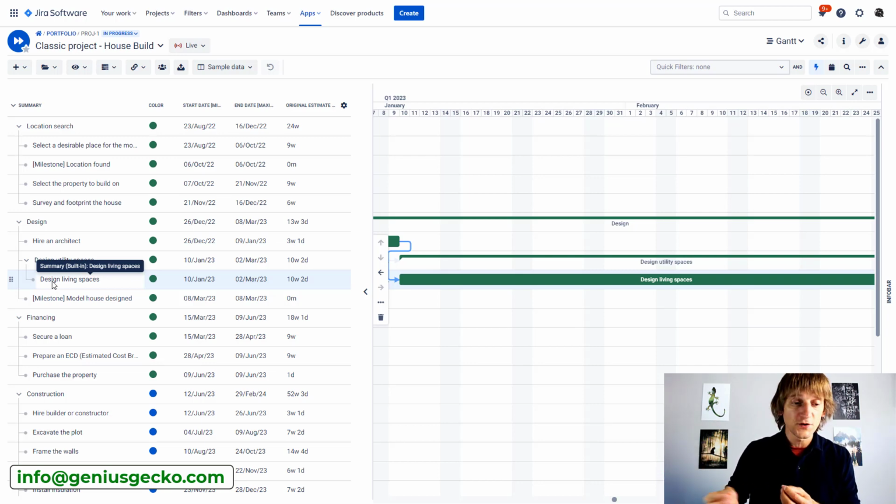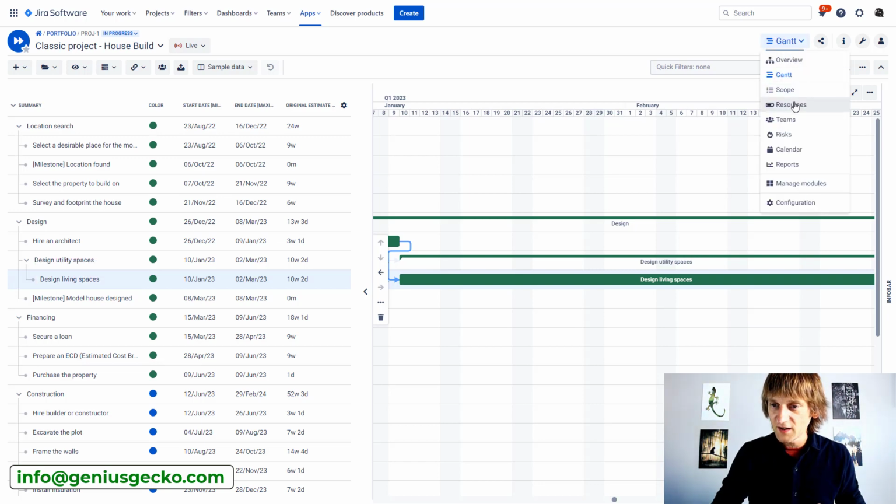It's a very useful feature to have, but of course, in this case, if such updates are enabled inside BigPicture, the user who cannot edit the task, the issue, will not be able to move it also in a hierarchy, because that would automatically result in editing the task, but it's not allowed for the user, hence he cannot do this. Moving on to objectives.